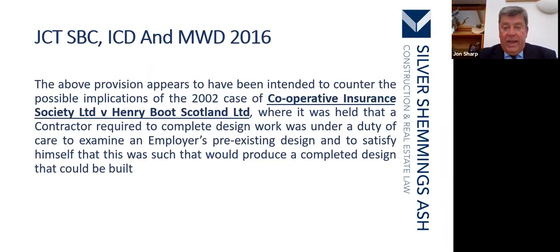Now, the above provision appears to have been intended to counter the possible implications of a 2002 case called Cooperative Insurance Society Limited against Henry Boot Scotland Limited, where it was held that a contractor required to complete design work was under a duty of care to examine an employer's pre-existing design and to satisfy himself that this was such that would produce a completed design that could be built. Well, I'm sure that's entirely fair.